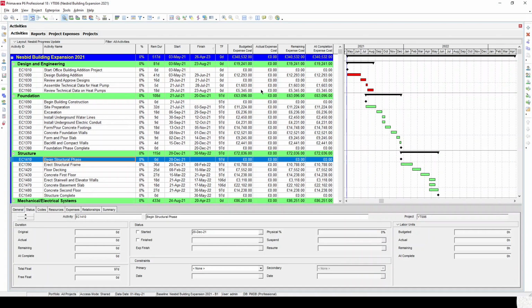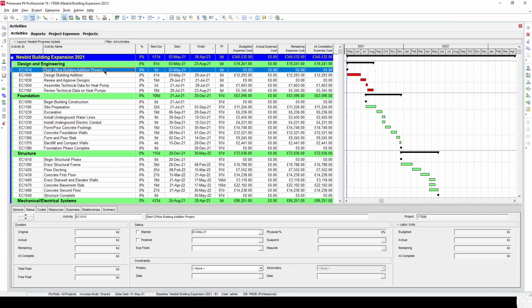Okay. So what I'm going to do now is progress this schedule to the end of May. Assuming the first progress report we want to do will be for May, we'll set the data date to 1st of June and progress activity. So I'm going to assume most activities have started as planned. I'll pause this video now, assign actuals for May, and then come back and generate the actual data and forecast data as at the end of May.